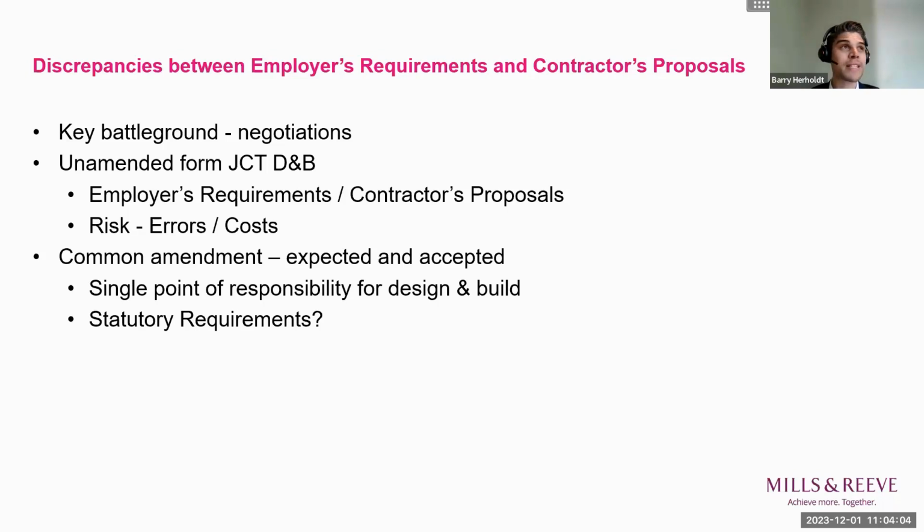The position can be slightly different if there's a conflict with statutory requirements. Why? While an employer may prefer to make the contractor responsible for changes in statutory requirements, this is not usually acceptable to contractors. The reason for that is the contractor cannot price for the risk of a change in statutory requirements that it does not foresee or could not reasonably foresee.